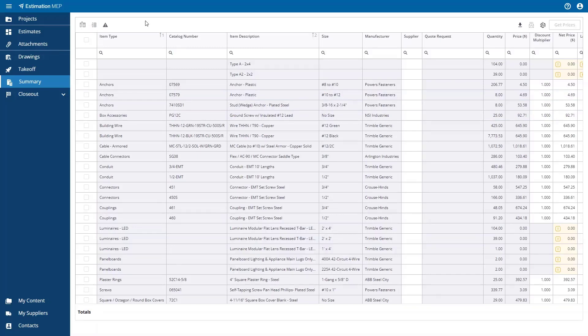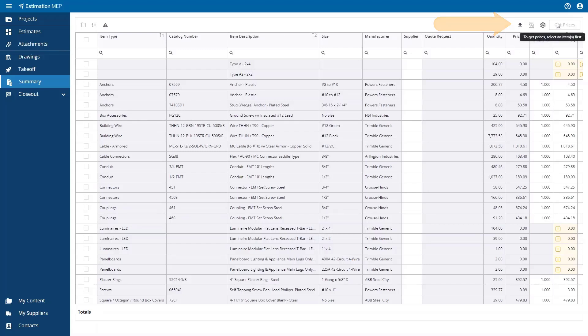Estimation MEP is connected to Supplier Exchange, and this allows you to quickly get up-to-date pricing from your distributors. The icons for this are in the upper right-hand corner of the screen. Your bill of materials can be sent to one or multiple suppliers to get up-to-date pricing when building an estimate. This is done by pressing the Get Prices button.